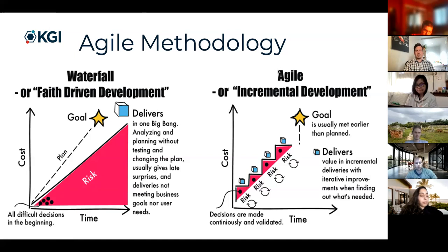Now with Agile, your steps you can see are much smaller. So a given step, let's say that my implementation is going to take 2 weeks, right? It's still the same looking graph, right? Where over time, I'm taking on more and more risk, but I'm ending it much sooner so that if it failed, if the customers don't like it, I only wasted 2 weeks of time. I only poured 2 weeks worth of money into that, right?